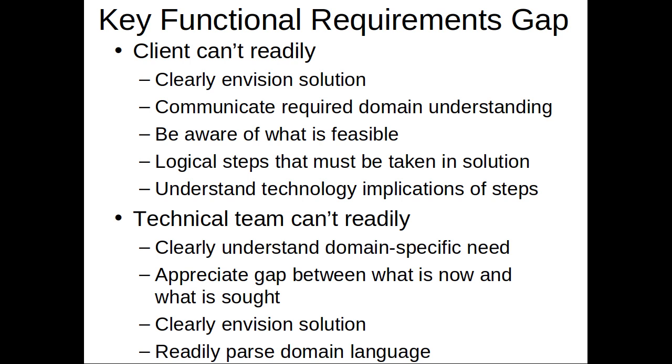And one of the worst issues is with respect to scheduling and estimation of the length of a project. Do not take someone else's statement that the project needs to be done by then, and you will be done by then, without even listening to you as to how long realistically it's going to take, because it's setting ourselves up to fail. That project may be declared a failure, not because it falls short in any material way of its technical promise, but because it was arbitrarily decreed that it should finish in 6 months instead of 9 months, and then you're judged as a failure because it took 7 months. And unfortunately, this happens a lot. And so managing expectations